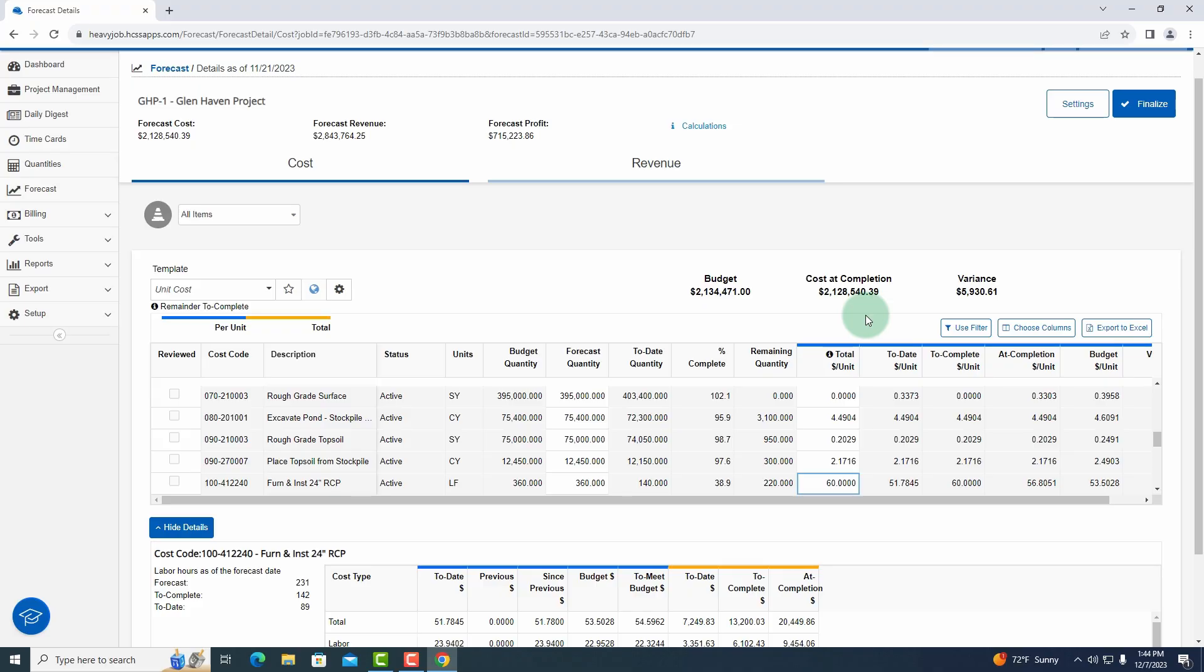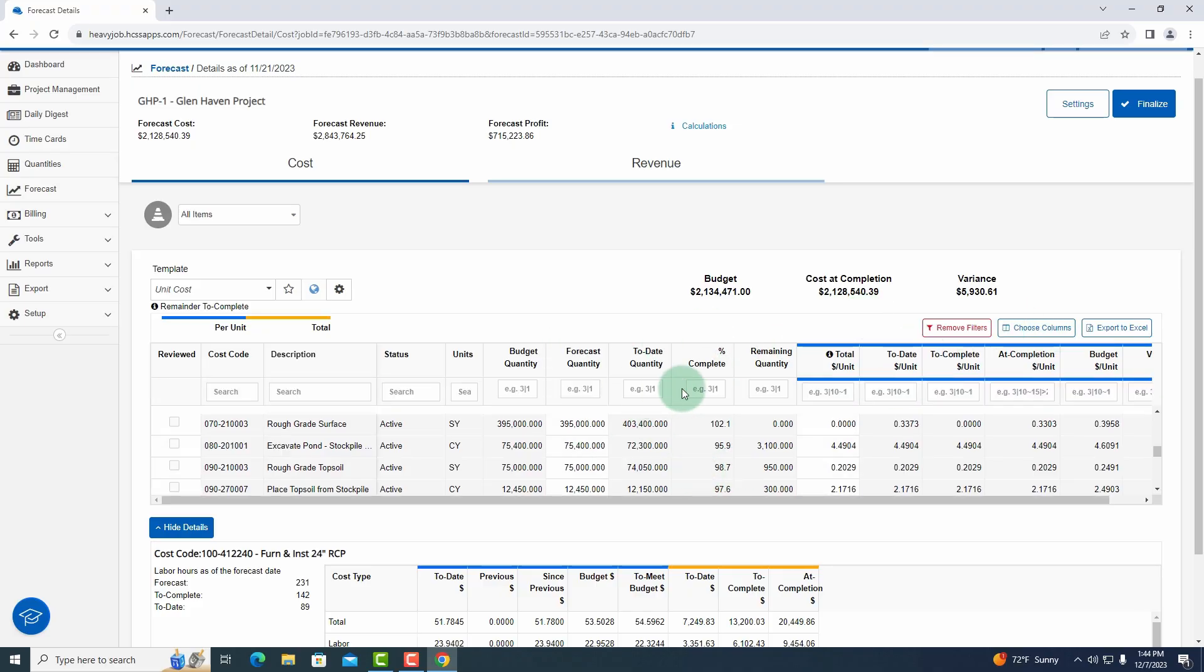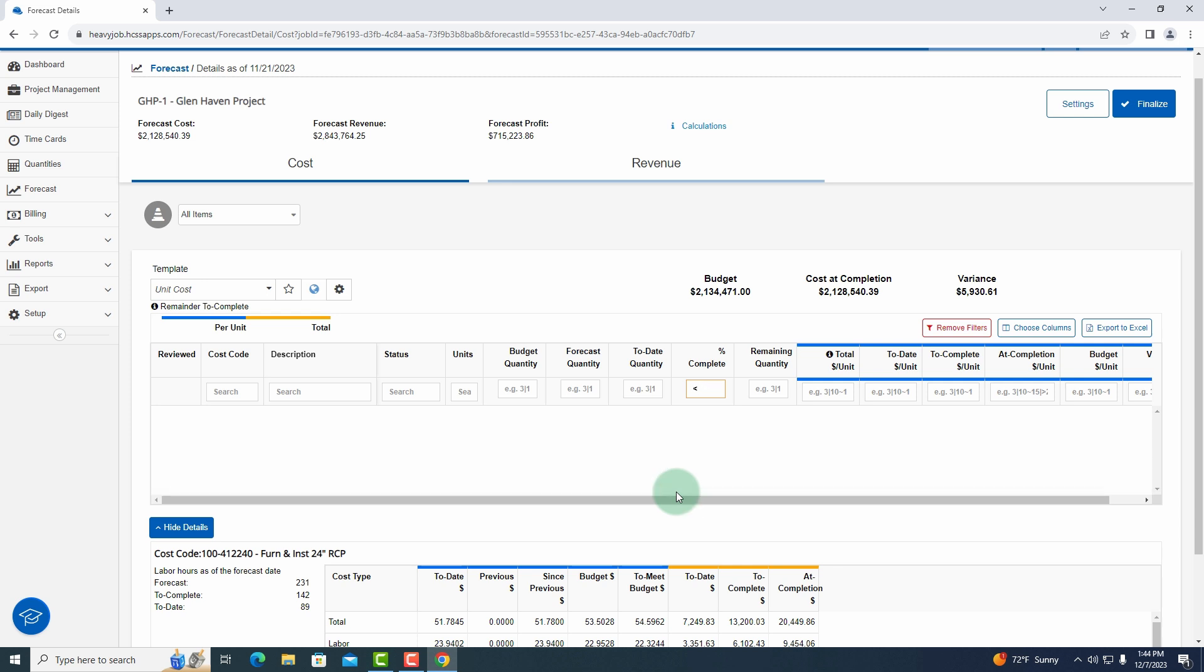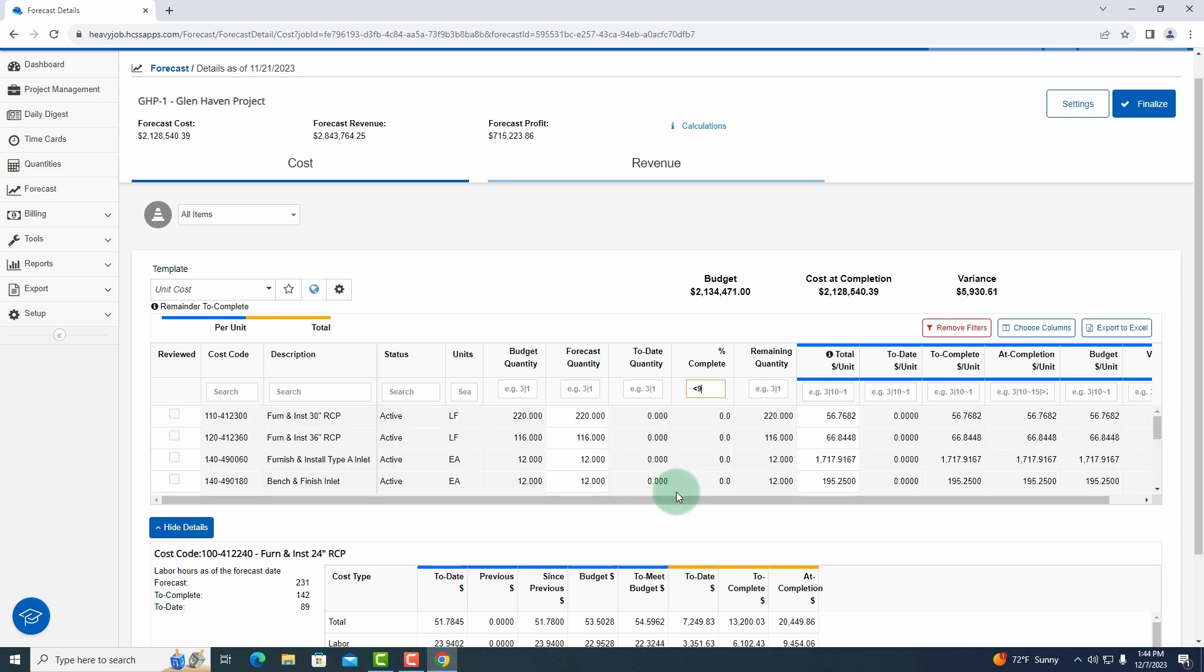So really we want to go through these cost code by cost code. You may not need to utilize it, but if you need to look at those and make those changes, as you make those changes they're saved. You can go out of the system, come back in, and then finish your unreviewed cost codes. One of the things to keep in mind is you have this use filter here, and so if you don't want to see any cost codes that maybe you've already completed, you can say filter anything less than 99% complete. And so now I can see none of the 100% complete items, the totally complete items, are in this list.